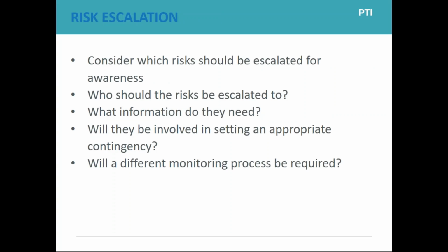You've identified your risks, you've prioritized them. How do you mitigate for those risks? Do you have the authority to mitigate? Do you need to escalate the risk to somebody more senior who might approve budgets or who might approve how the CRO would go into another country for you? So as part of your mitigation, what is important is knowing how to reduce the risk of the risk you have identified and mitigating it appropriately in front.